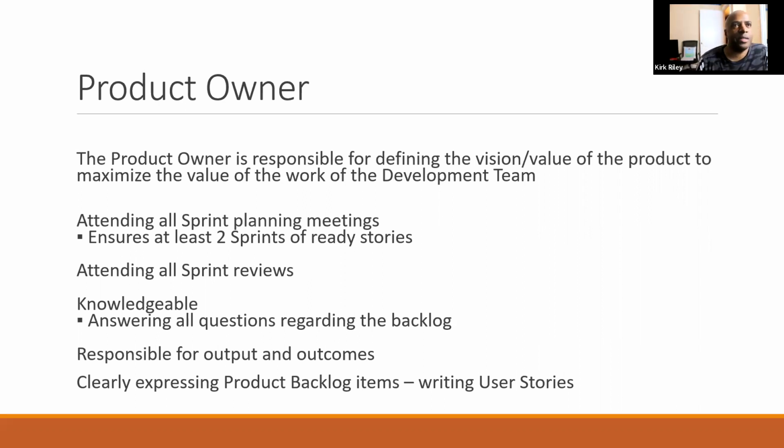So how I prioritize it. What my product manager wants us to do is, when I get a feature, I give it a business value. I don't use Moscow or anything like that. I look at the features and I basically say, okay, what value is this bringing to the business? And I may give it a score on a scale of 1 to 10.